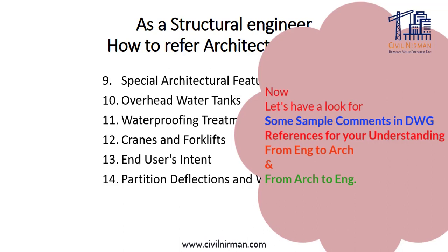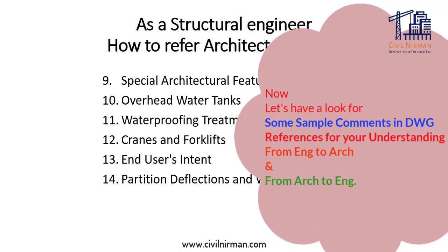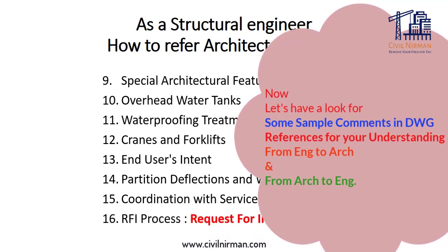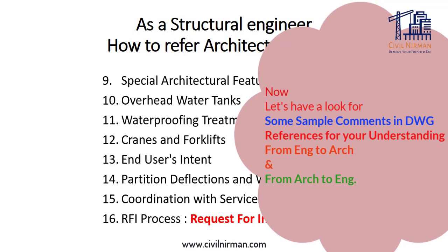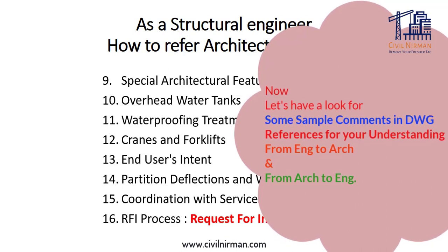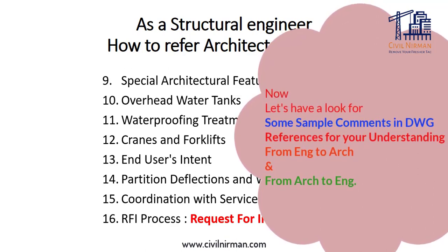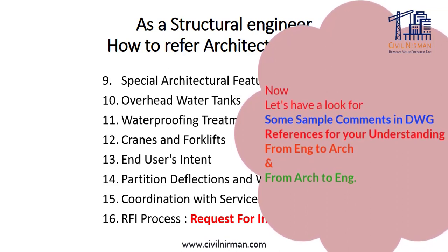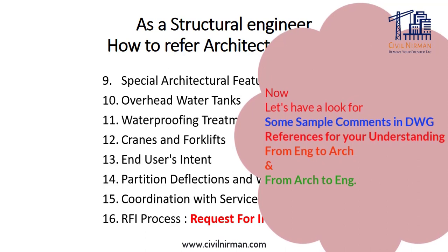Now see, any discrepancy from the above scrutiny should be brought to the notice of the architect in an RFI. So what is the RFI? RFI is known as request for information. This matter should be sorted out before proceeding with any design. So try to get as many RFIs as possible in your first RFI.